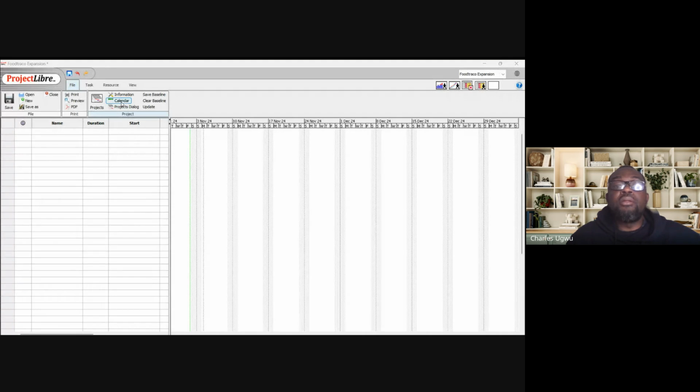We can see here working days is between Monday to Friday. That is the default. If you want, you can customize it. For instance, if you want to work on weekends, then you can use your own customization.